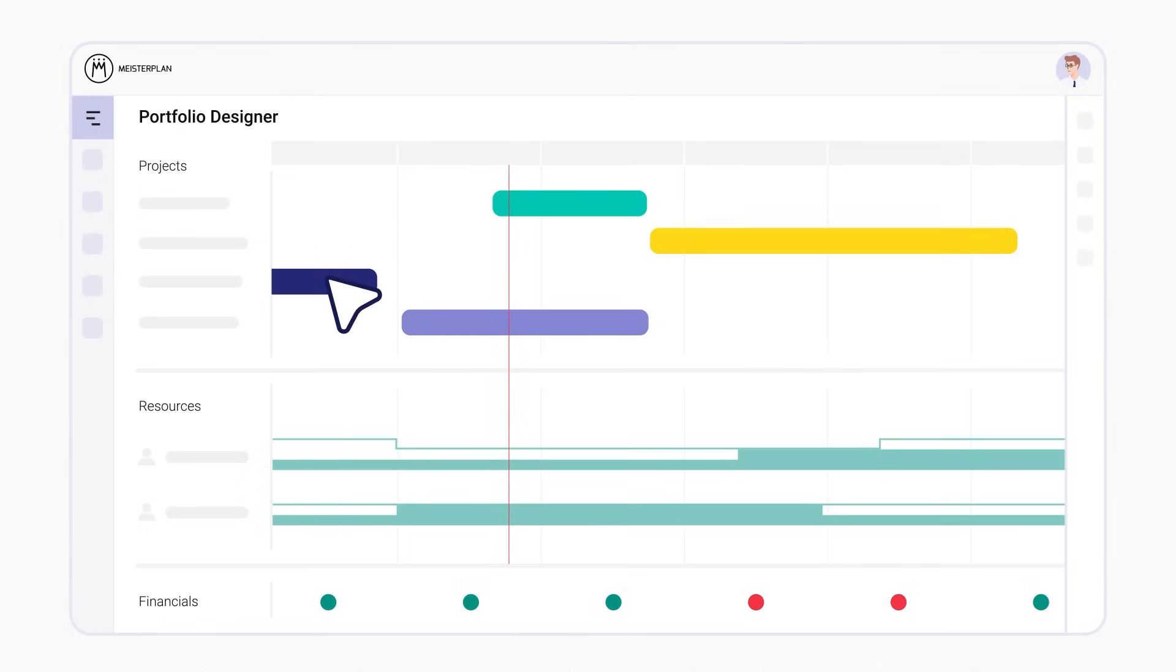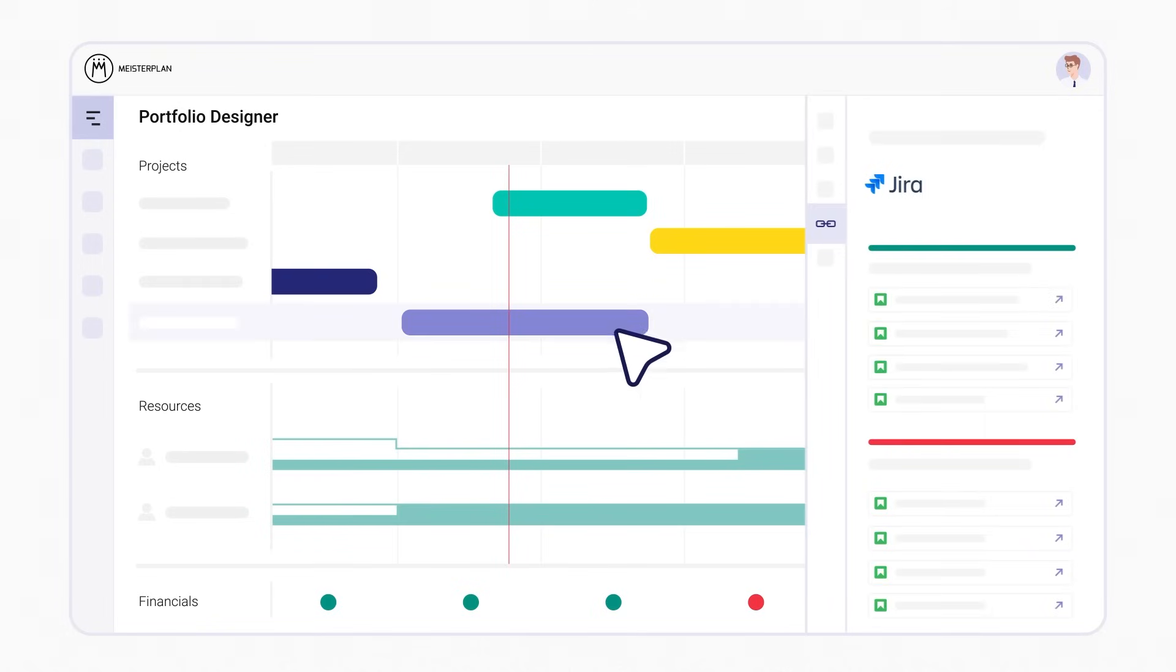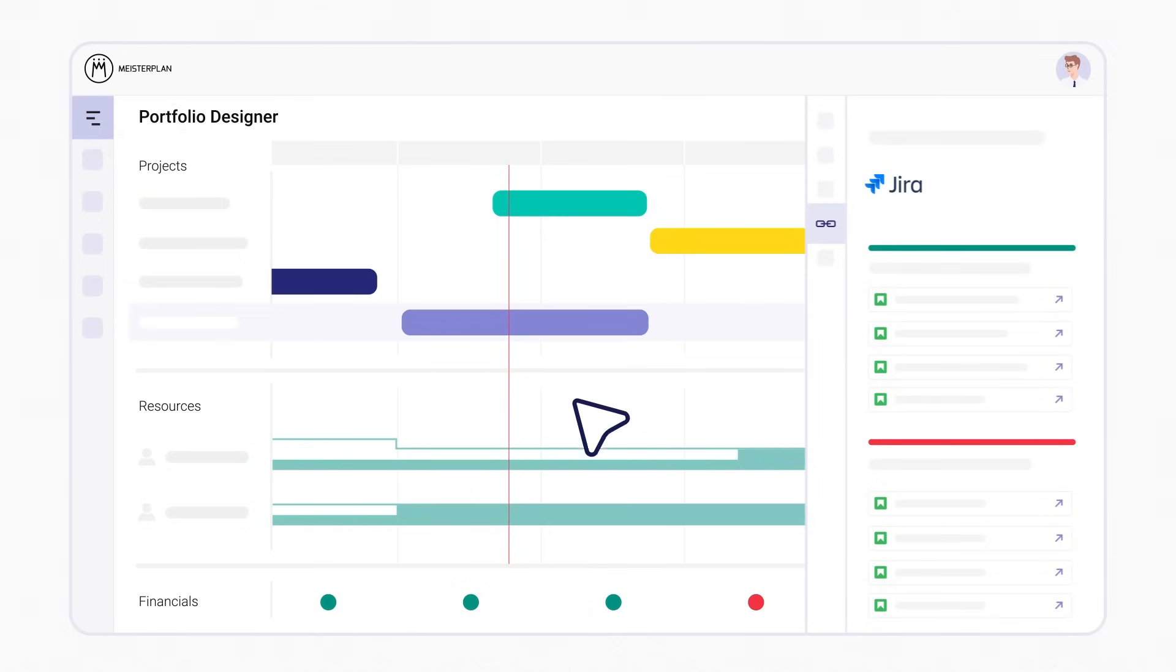Do some projects require more effort than originally thought? To make sure they align, you can compare on the project level the allocations planned in Meisterplan with your team's estimated effort in JIRA, without overwriting any data.